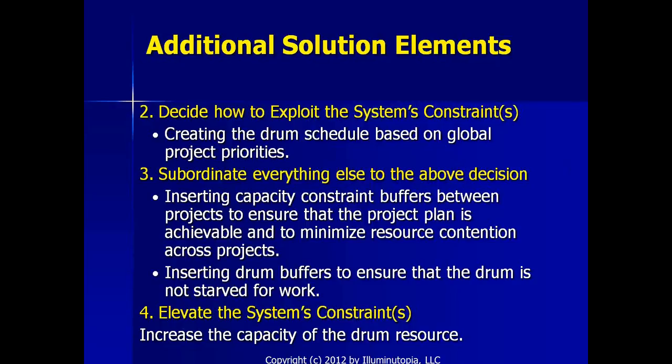Okay, the drum buffer is to ensure that the drum is not starved for work. So what it is, it's a protection to make sure that the drum, basically what we're doing is we're making sure that the drum always has work to do. So we're putting protection in the plan to ensure that the drum is never starved for work.